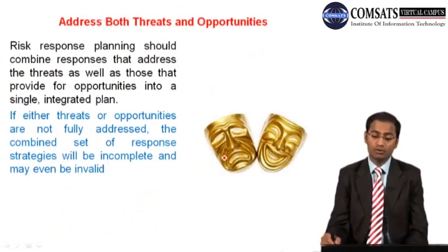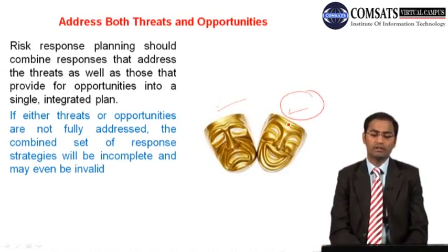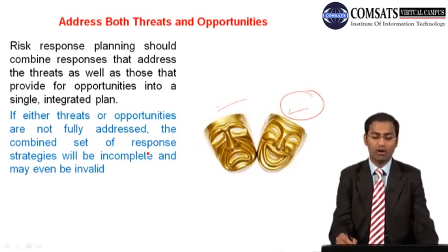And then you want to address both. If you are so afraid of this, you should also be finding this one as well. So risk response planning should combine responses that address the threats as well as those that provide for opportunities into a single integrated plan. If either threats or opportunities are not fully addressed, the combined set of response strategies will be incomplete and may even be invalid. So this is very important.